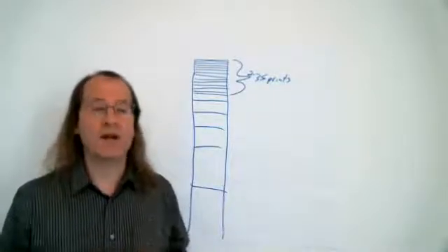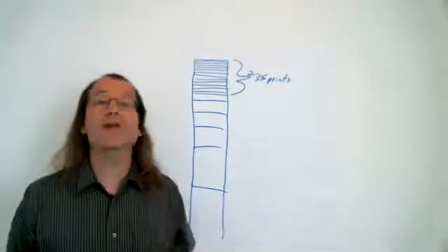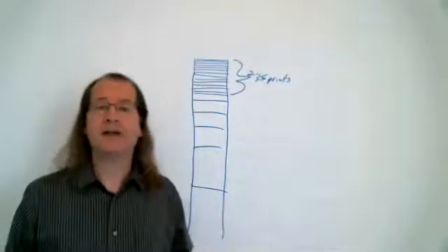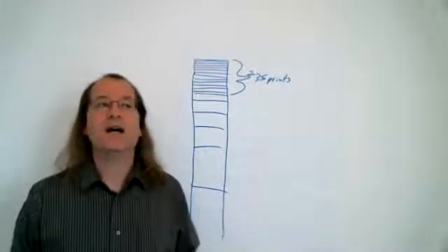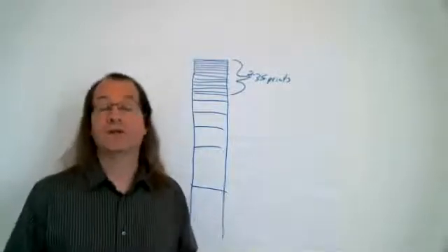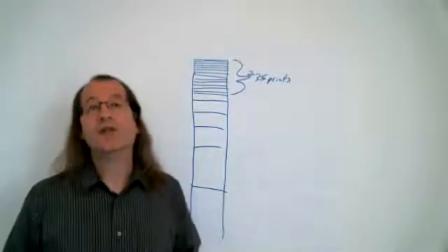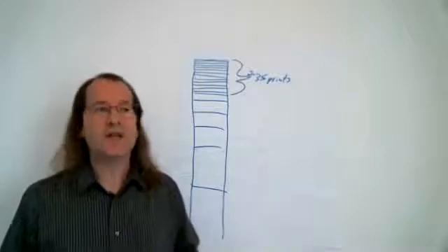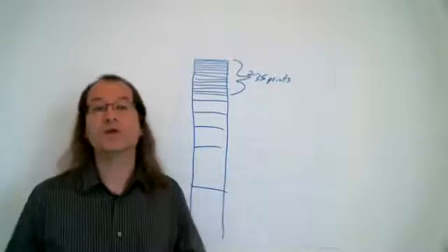Everything would start to slow down. Sprint planning starts to take a long time because we don't really understand the things that we're being asked to deliver. And quite honestly, the success rate of our sprint planning goes down, right? The amount of times that we actually deliver the stuff that we committed to starts to go down because, well, we didn't fully understand them when they were coming into the sprint. So to avoid that, we want to do regular product backlog refinement. And there's a whole series of activities that the development team and the product owner are going to engage in.